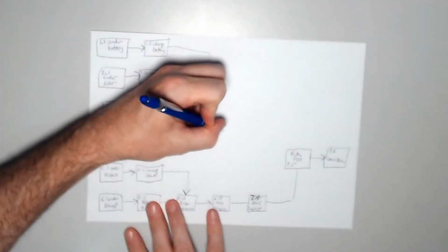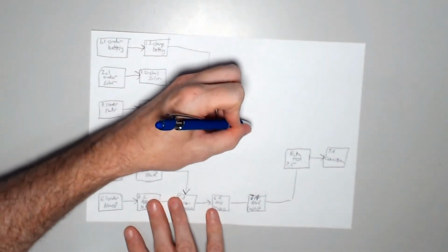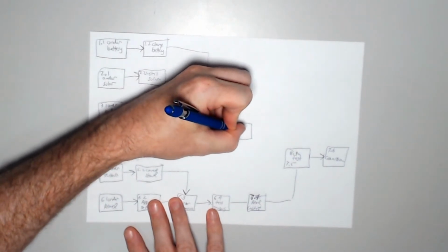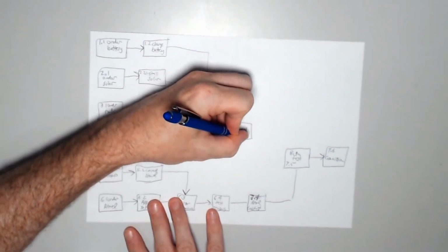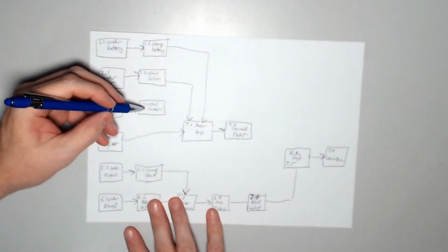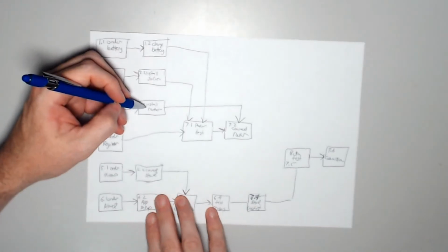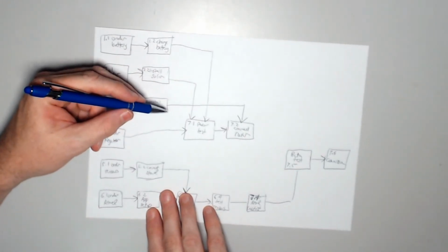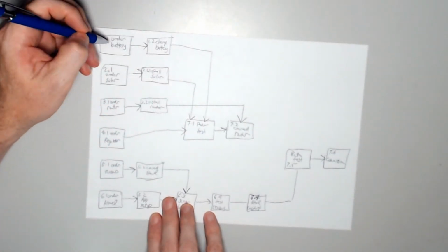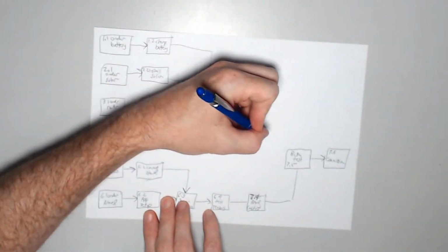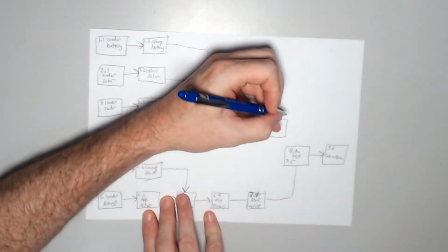So assuming that power test goes well, we then need to connect everything up. So we've got a stage here, 7.2 connect router. To do that though, we need that router installed. So there's an arrow here, a dependency. So that's a predecessor to this connect router. Then I want to do a field test without the Atmel. So a field test with our battery, solar, regulator, and we're going to include the router in that as well. So basically those items are powering the router. So this is another field test,